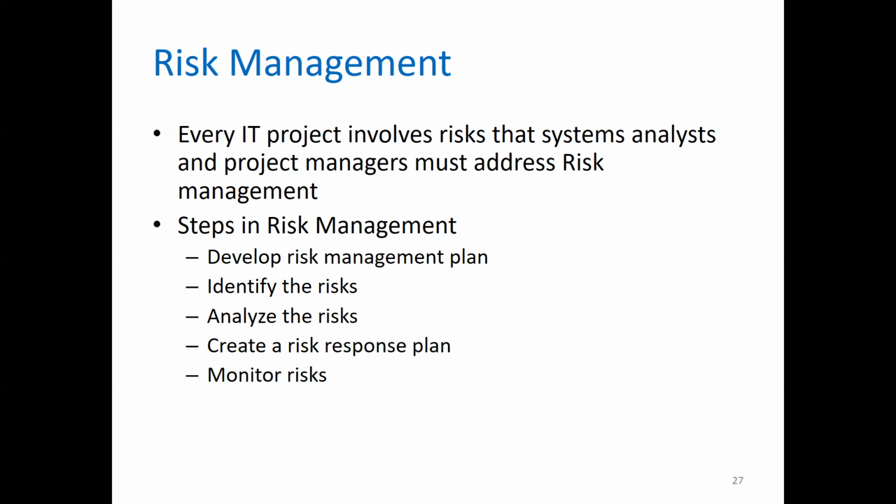So you should identify it, and once you've identified it, analyze it. Analyzing in terms of, is it manageable? Is it something that is going to affect the project? And then you need to create a risk response plan. A risk response plan is basically a plan of how you'll tackle a specific risk or risks, and then monitor risks. That means once you have responded and mitigated the risks, you need to monitor and see whether it still affects the project or the risks have faded away.